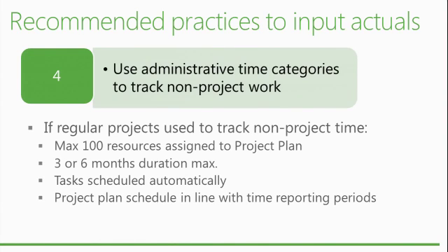Try to have tasks that are not too long, like three to six months maximum. We have seen some admin projects where tasks were like 10 years, for example, with 300 resources on it.